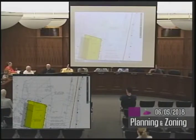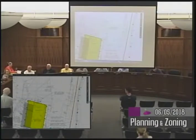Derek, would you explain a little further the ability to finance this? You said you're even thinking of designs that might be smaller in case you don't have it, but you've been setting money aside in the capital budget. I haven't seen it in the capital budget, but I may not have looked, or it's disguised in some other terminology. For the past 6 years, we've been putting money away in our capital improvements project. If you look at the town budget under capital improvements, each year there's been a line item for salt shed, and that is where I've gone every year since I've been here to request funding, knowing that these types of issues are quite expensive, and therefore we wanted to build it up over time.